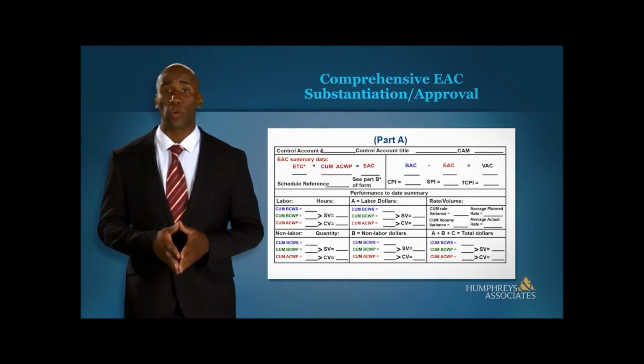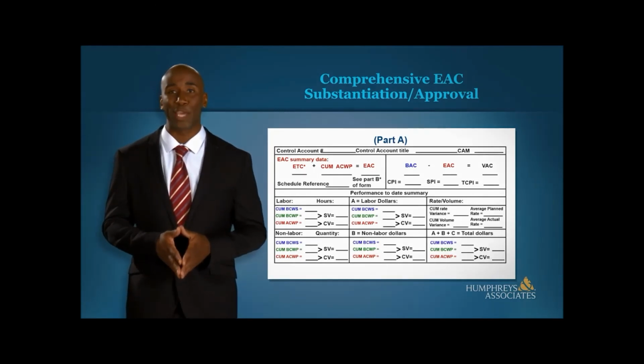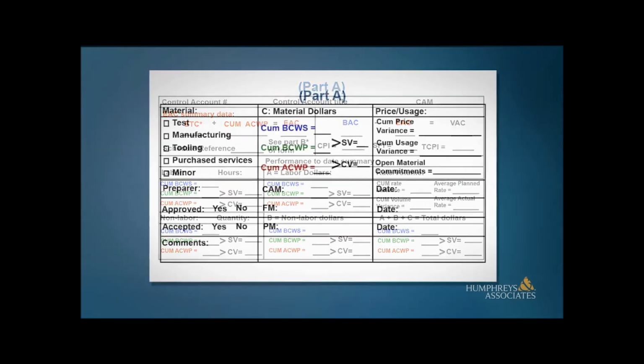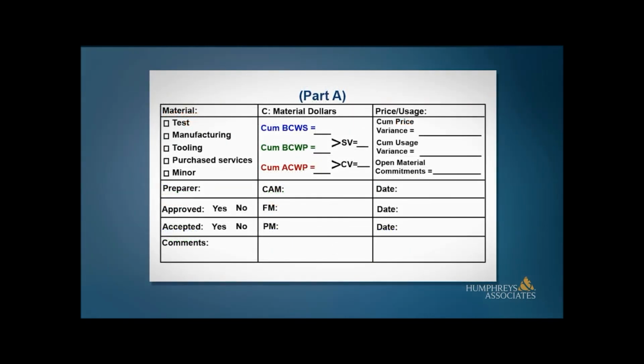This is an example of a worksheet that could be used for EAC documentation. It has information about what has yet to be accomplished as well as the BAC, EAC, and VAC. There are calculations for EACs that can help to determine the realism of the EAC. These will be discussed in the next part, indices. Those who use worksheets to document their EACs consistently derive more accurate EACs.